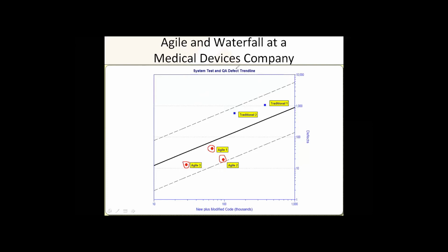So when you're looking at moving from a scenario where in the traditional environment they had about double the number of bugs found and fixed, to half, if you're going from double in one case, which is right here, to 50% fewer, your end-to-end reduction in defects in terms of code density is a factor of 4. So you went from twice the industry average to half the industry average. You've effectively reduced your defect density by a factor of 4.